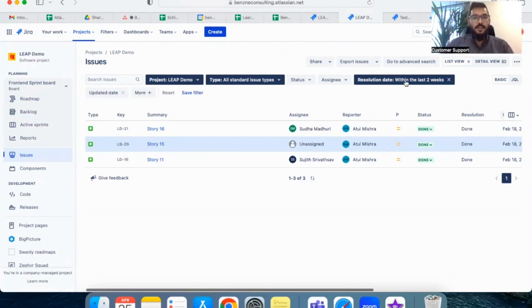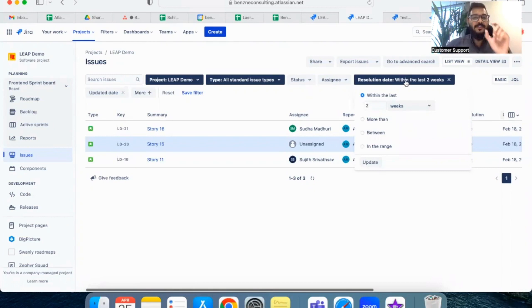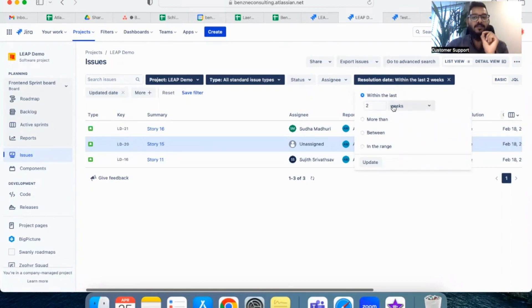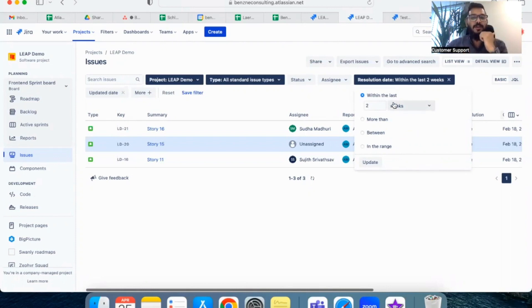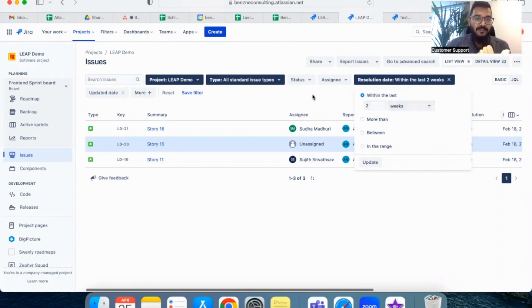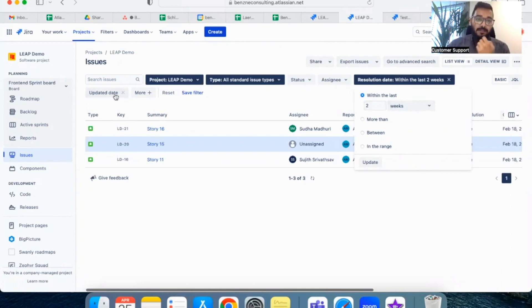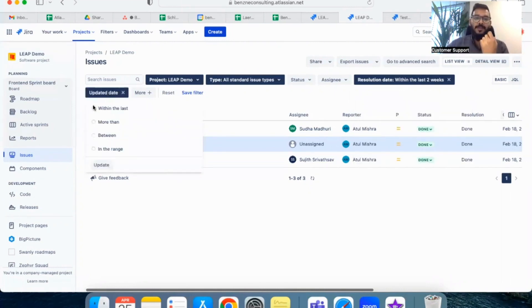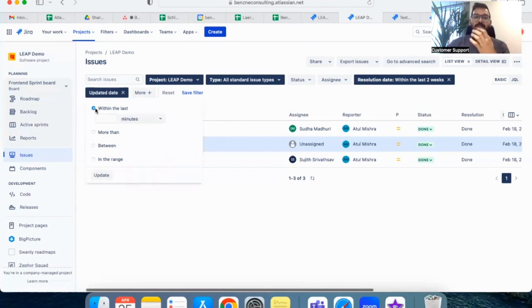If you noticed, I've used a field called resolution date, and I've filtered all the tickets which are resolved within the last two weeks. The duration can be need basis and you can customize it based on your need. The other field which you can use to filter out the ticket is updated date.